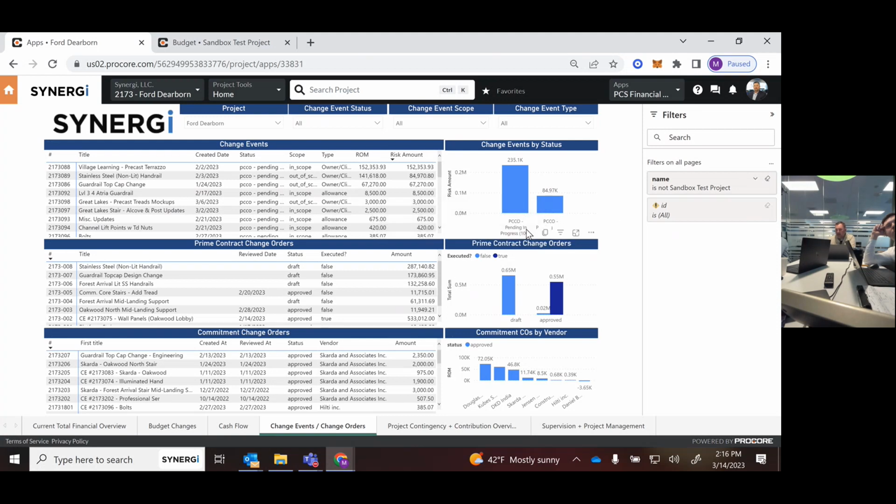We either have pending or we have pending in progress. We have $235,000 in pending in progress, which is kind of a lot. I mean, that's a talking point. And here's how those all add up. So essentially, those are risks that we're trying to discuss at that point.